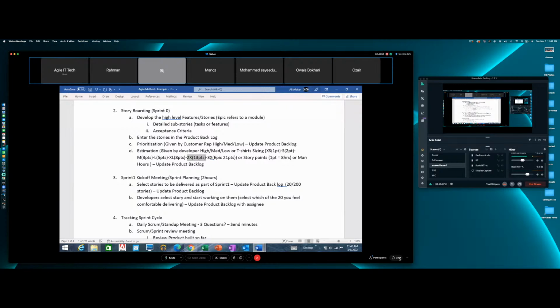And then divide that between your team. So you remember in that example, 4 stories, those 4 stories might have many, many subtasks, right? That can be divided between the team. And the goal is to break it into subtasks so that we can continuously show progress.